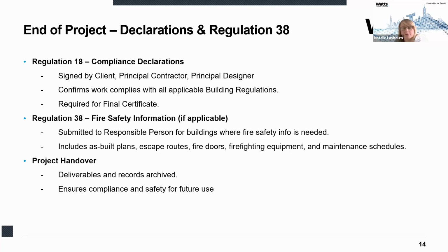You have the principal or the sole contractor who confirms they have fulfilled their duties under Part 2A of the Building Regulations 2010 regarding duty holders and competence. And you have the principal designer or the sole or lead designer who confirms they've fulfilled their duties as the principal designer, again under Part 2A of the Building Regulations 2010. All these declarations are submitted using a compliance declaration notice, and the signing of these forms is required to obtain building regulation approval and the final certificate. Essentially this process ensures that all parties take formal responsibility for compliance and that the project is legally and safely complete.